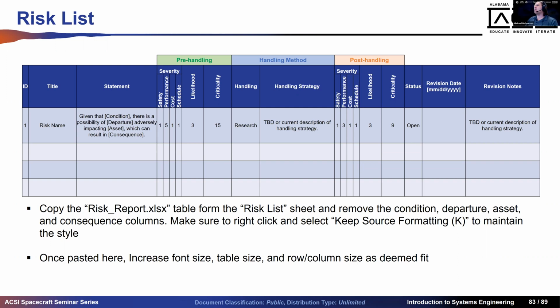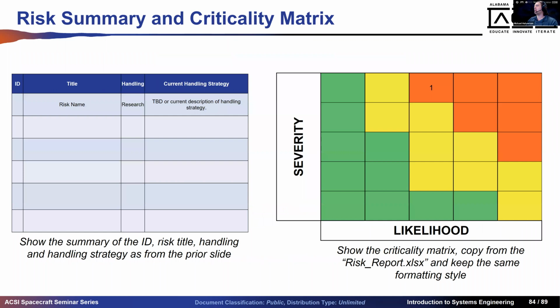Criticality is going to auto-calculate. It is just likelihood times severity. It's used in the calculation of where this goes. I see. Like 5 severity and 5 likelihood is going to end up here, 25. Gotcha.